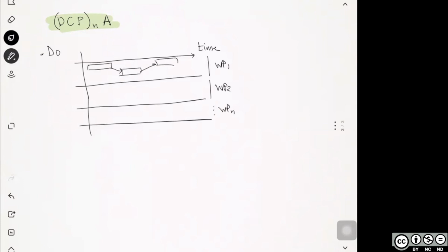They're dependent actions, okay? So let's say this is work package 1.1, 1.2, 1.3, 2.1, 2.2, 2.3, 3.1, and so on and so forth. And these actions depend on each other. So remember, the house, you cannot build the roof without having the ground laid, okay?